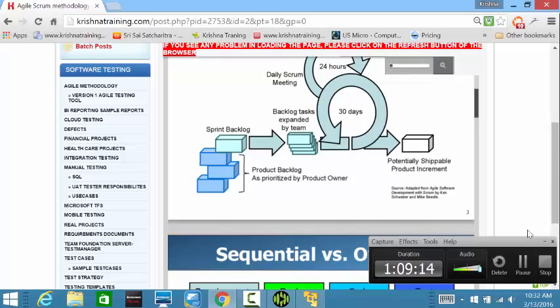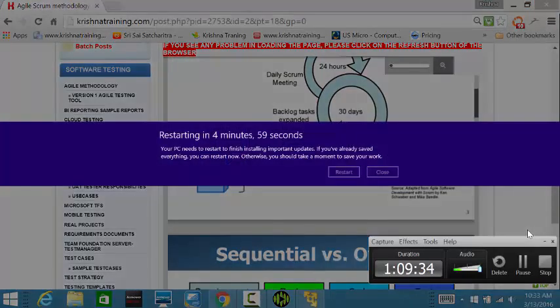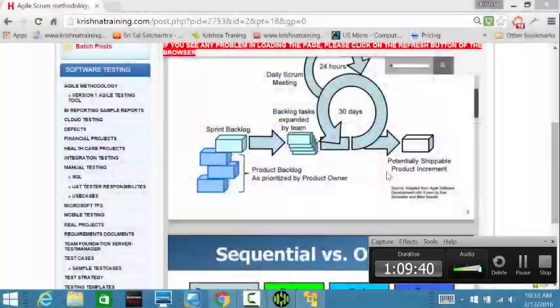And in the 9th month, we do all kinds of preparation activities for the deployment to get it into production. So we'll deploy it in the second week of the 9th month, and we do post-production support for another 2 weeks. Post-production means after deploying to production, we have to see whether the application is stable in production also, right? Each environment would be different for that application based on the user load and everything. So that's how the whole piece of work, the whole set of requirements, got split into the sprints, scrum, and implementation.